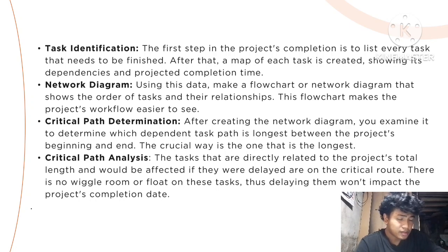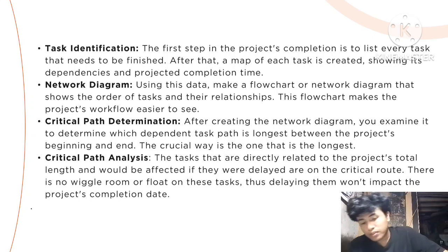Critical path analysis. The tasks that are directly related to the project's total length, and which will affect it if they are delayed, are on the critical route. There is no wiggle room or float for these tasks, thus delaying them will impact the project completion date.